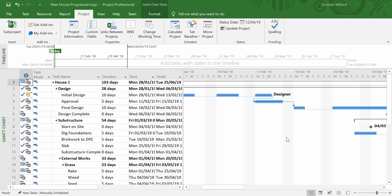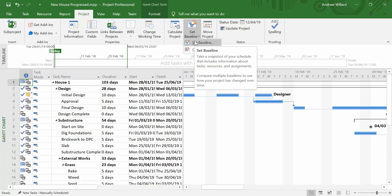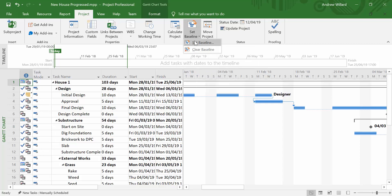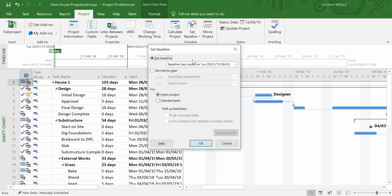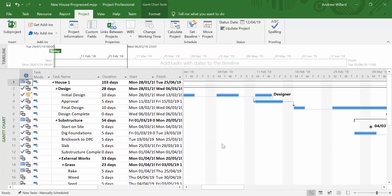Here I have a Microsoft Project file with some progress. A status date has been set and we've updated the project to move uncompleted work to the right so that we're able to look at slippage. At the start of the project, it's really important to set a baseline to have something to compare against.